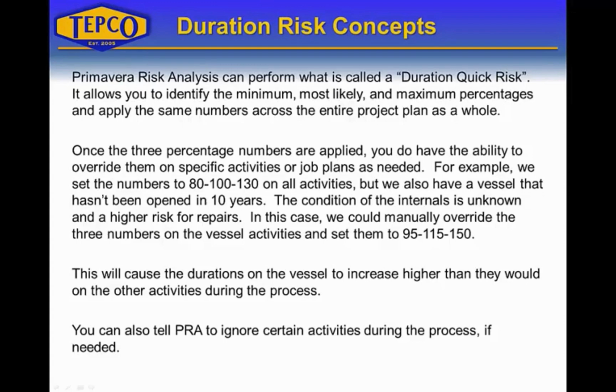You can also tell Primavera risk analysis to ignore certain activities, so there actually is a checkbox in there that allows you to turn specific activities or entire job plans off and tell Primavera risk analysis don't even run risk analysis against these jobs or these activities.